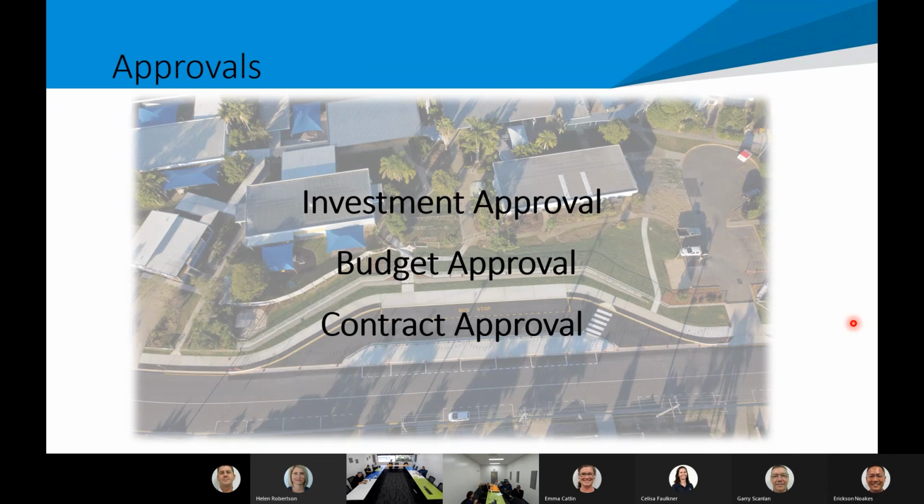I've got my water reservoir and we're going into concept design. I might get my gate approval today, so we're in 2021 financial year, but I've got no budget currently because my forecast said it wasn't going to be until 21-22. So all the budget sits over in 21-22,